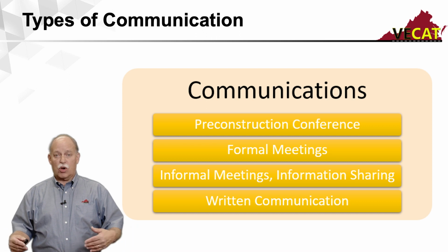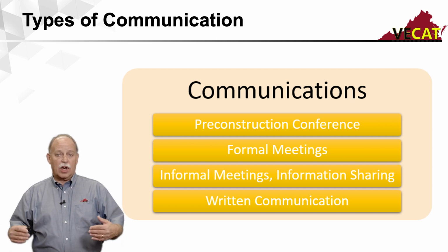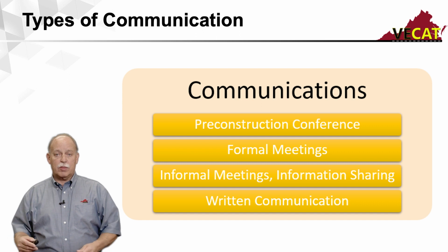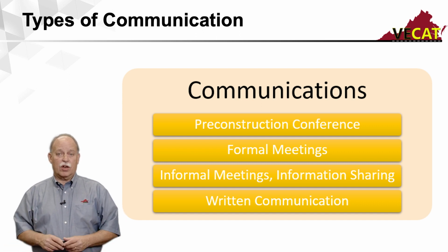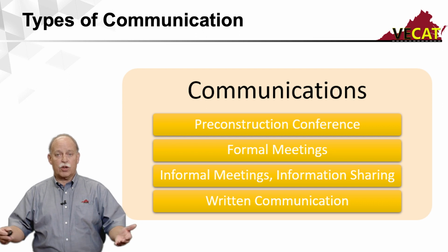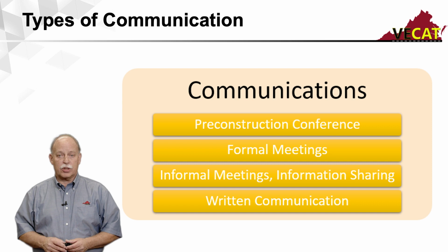At that meeting, you'll talk about everything from schedule, how you're trying to execute the work. Anything that's come up that needs to be altered early on in the project will be brought up at that point in time. A lot of the environmental requirements, as well as some specifics again on how you're going to execute that job from day one, and then ultimately how you're going to get it completed on time and on budget.